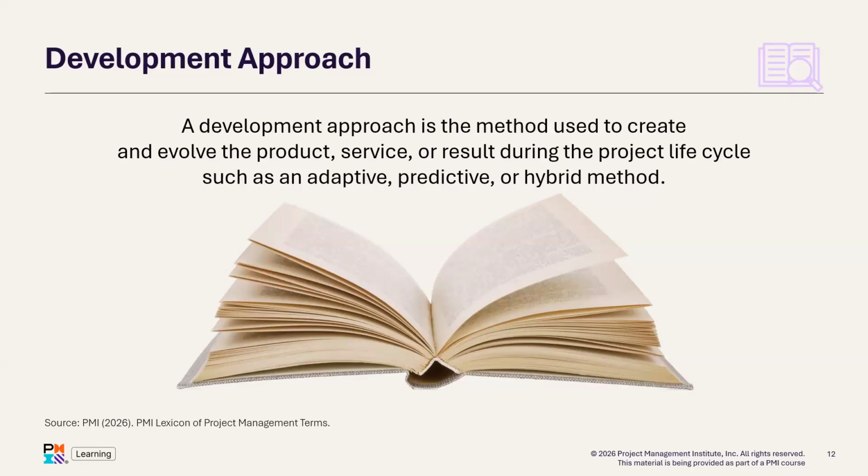When we say a project is well defined, it means requirements are known. And requirements are mainly about stakeholders' expectations. It is a project that can be planned into detail because what is expected is known and how to deliver to expectation is also not in doubt. So such a project, we can plan it into detail and follow the plan day after day to complete the project.